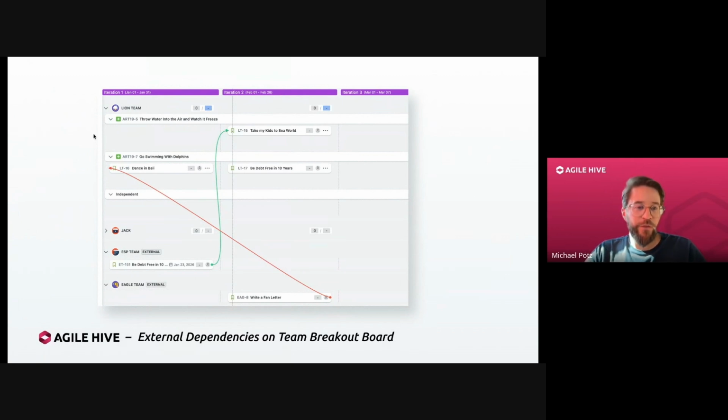So, like with the teams that partake in the art, teams that have dependencies to issues in this art will be displayed in their own swim lane that you can expand and collapse and see the dependencies to issues within the art. Only issues from this team that actually have a dependency are shown here. And only issues that fall within the time span of the PI that we are currently watching are displayed here. This is, in case of this issue here, for example, a due date that you can set on the issue.